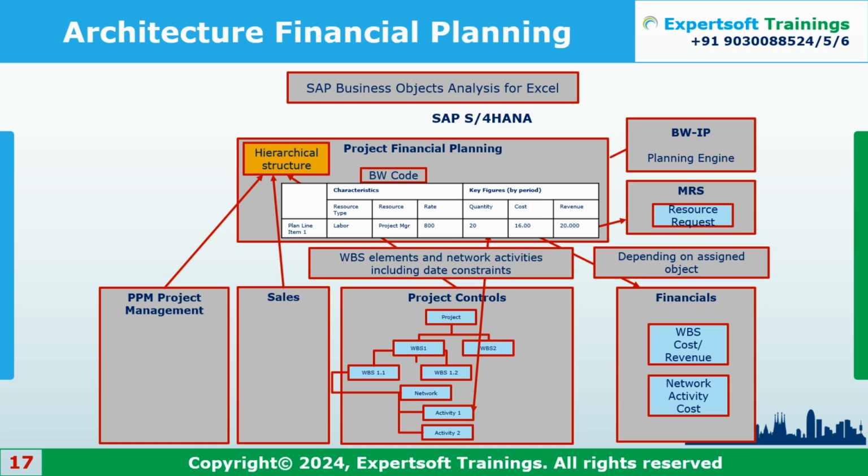No, no, CJ40 is hierarchy-based cost planning. But that hierarchy-based cost planning doesn't have any GL. To transfer the data from CPM to PS or PS to CPM, you need a GL account for that. So you can do detail level cost planning, easy cost planning, or CJR2-based cost planning, and then you can transfer the data. Even if you transfer the data from CPM to PS, it will not sit in CJ40. You can check in CJR2, detail level cost planning, or easy cost planning.